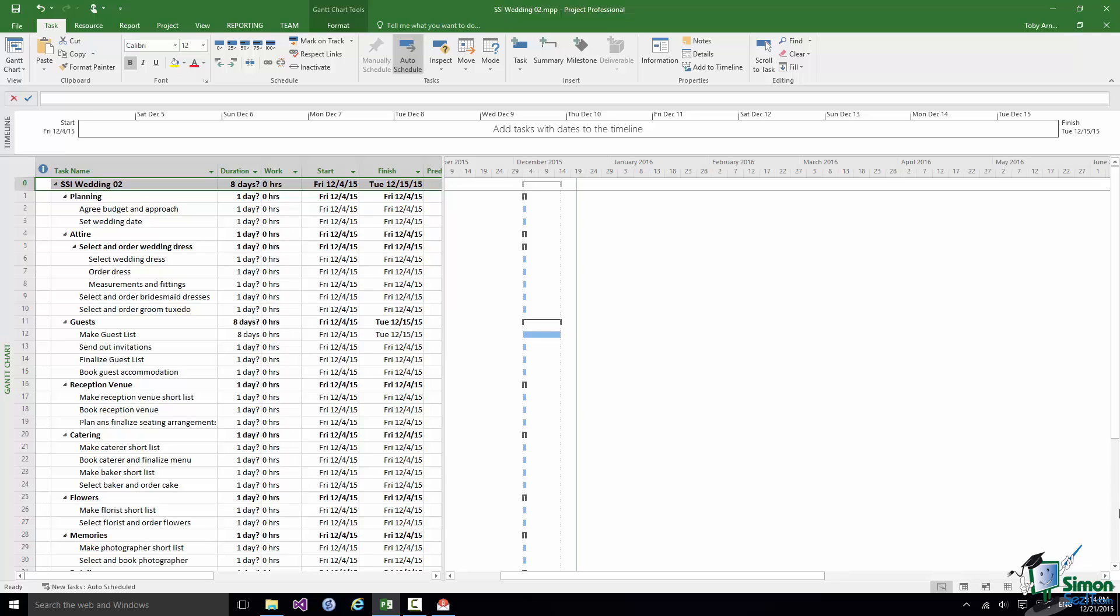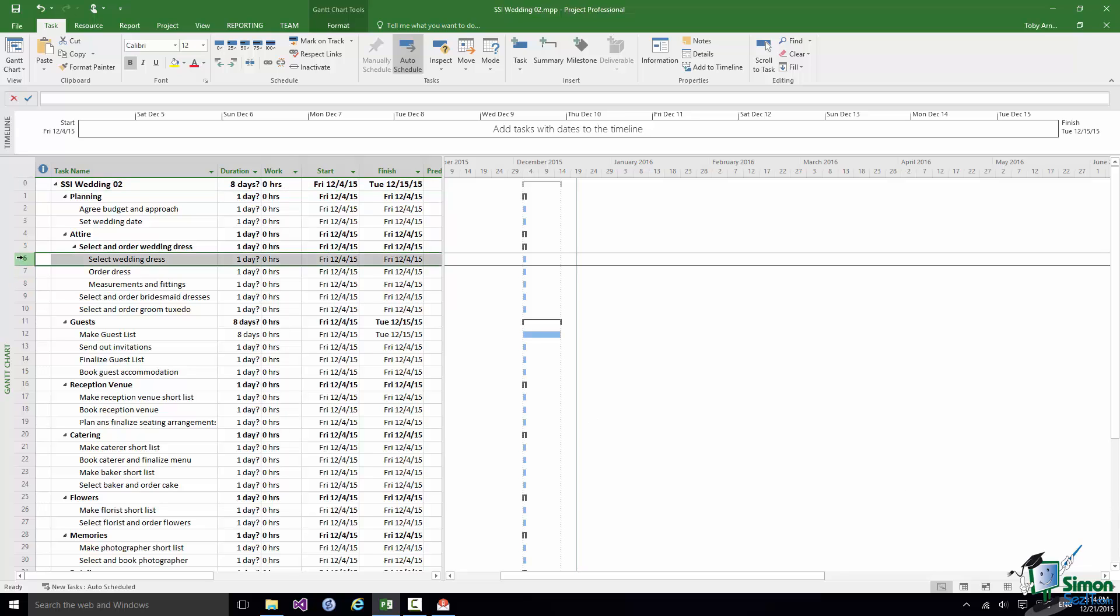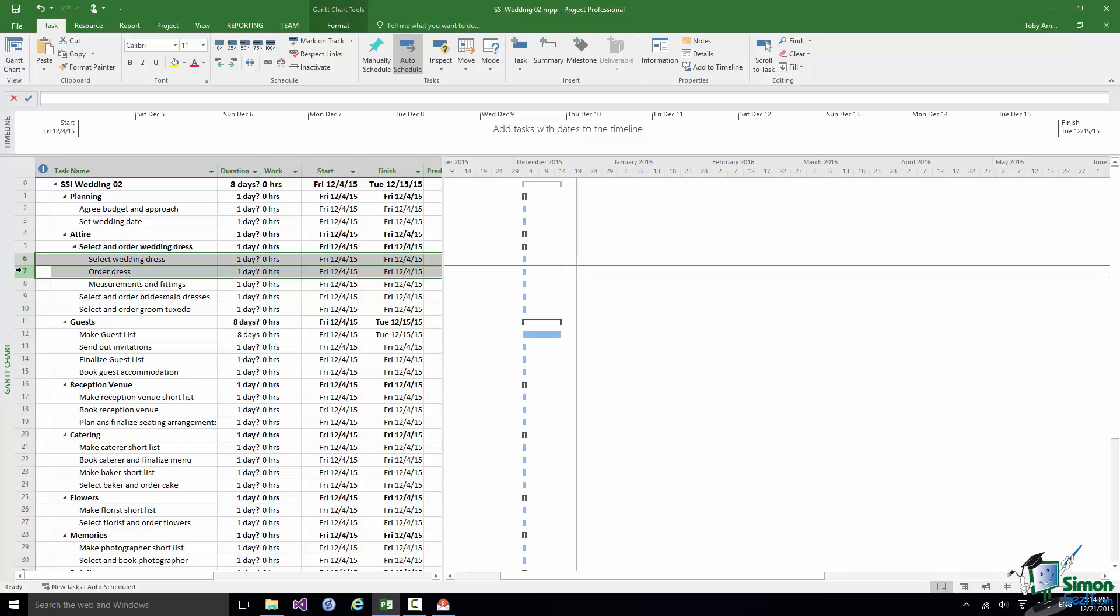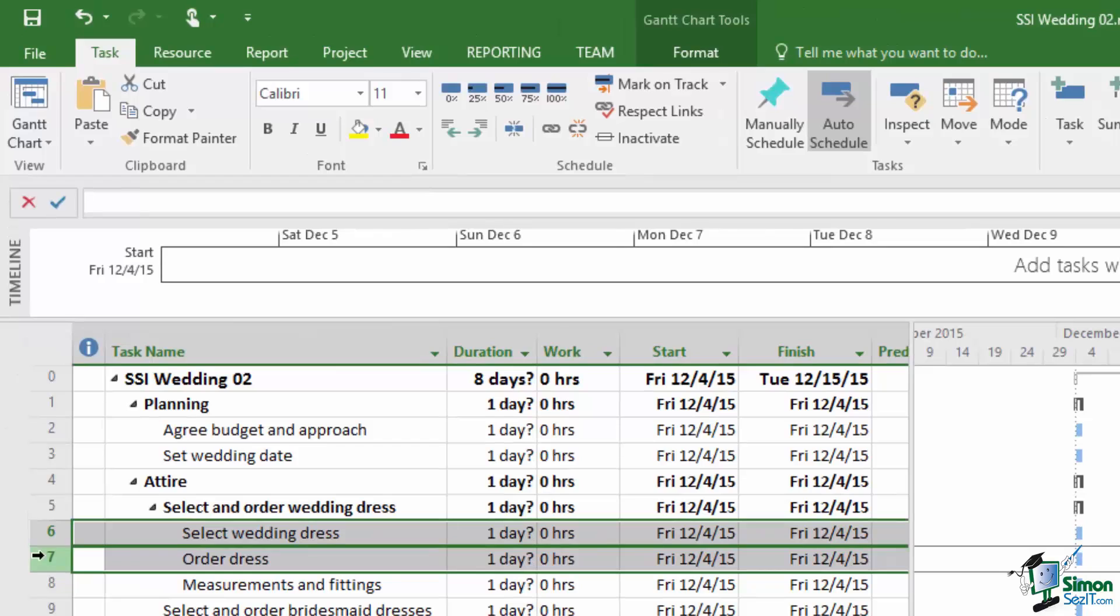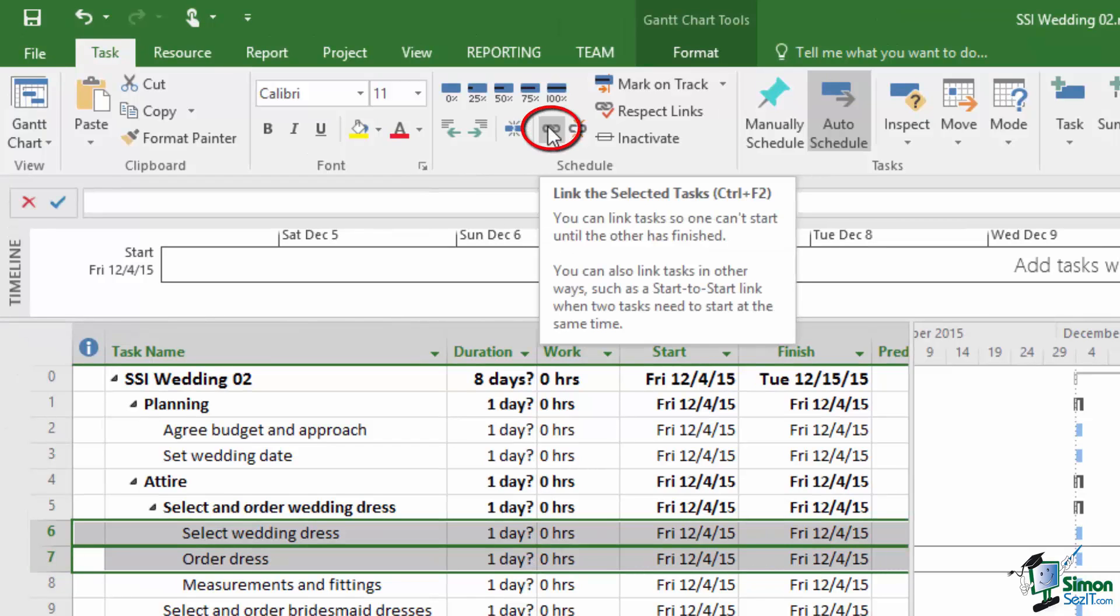If I want to record in my schedule that one task is dependent on another, the very simplest way of doing it, let me select the first task which is 6, Select Wedding Dress. Hold the Control key down, press 7, Order Dress and then on the Task tab in the Schedule group there is a button, a chain link button that says Link the Selected Tasks.